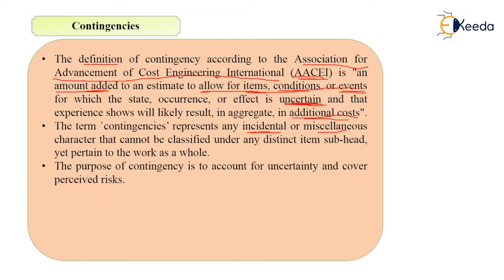The purpose of contingencies is to account for uncertainty and cover the perceived risks. For example, if you are excavating for a footing and calculating earthwork quantities, you do not know at what depth water will be found at the site. At the time of excavation for footing trenches, you may find a lot of water that needs to be pumped out. That pumping cost is not included at the time of estimate preparation, but it has to be added into the contingencies.